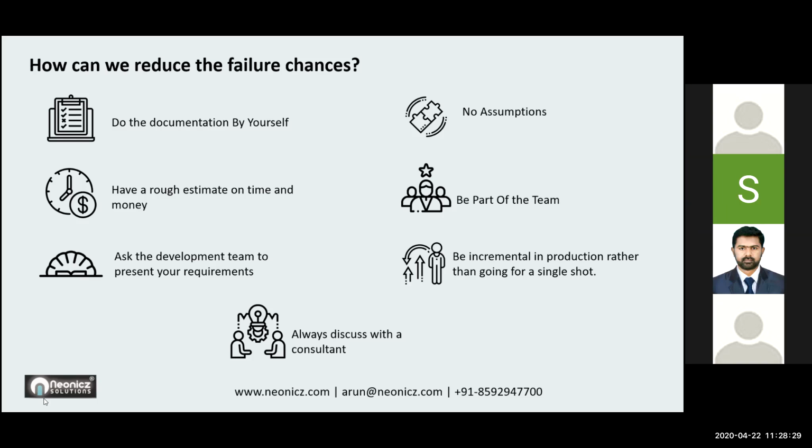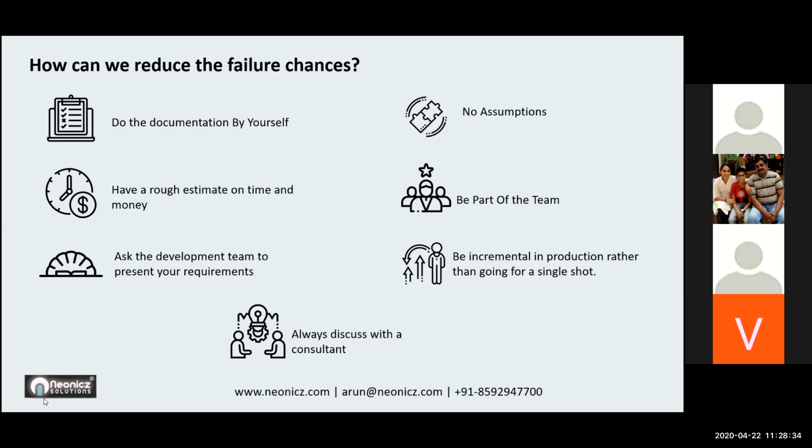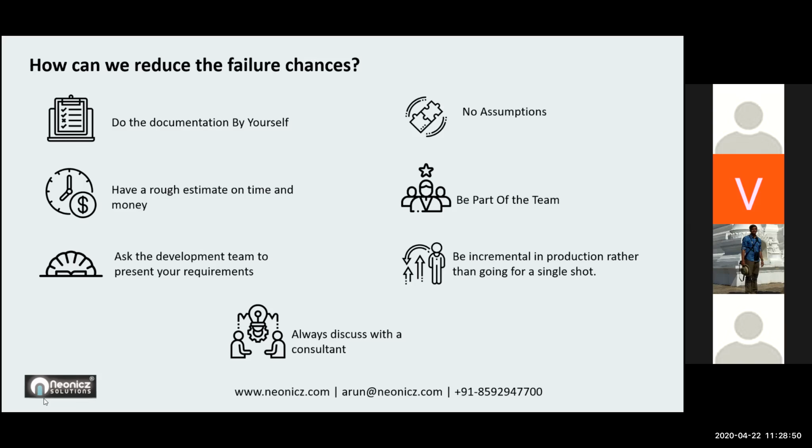Then they came back and checked what had happened. The developer claimed that you didn't share that requirement with me. Then the customer said that it is a default requirement. But there is nothing default. You have to explicitly ask, I need this. Only then are they going to develop it for you. So all those things should be considered under a checklist, and that checklist needs to be evaluated each time the delivery comes from the development team.